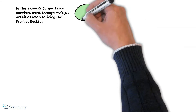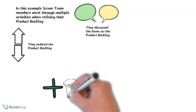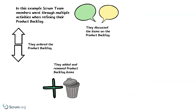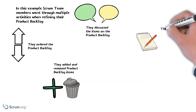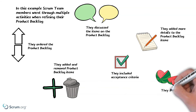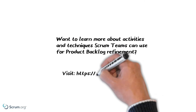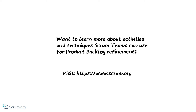This was just one example of a team refining their Product Backlog. There were multiple activities the team went through in this example: they discussed the Product Backlog items, they reordered the Backlog, added and removed Product Backlog items. Additionally, they added further details including acceptance criteria, and they broke down a large Product Backlog item into smaller sized Product Backlog items. Want to learn more about activities and techniques that teams can use for Product Backlog refinement? Visit the Scrum.org website. Thank you for watching.